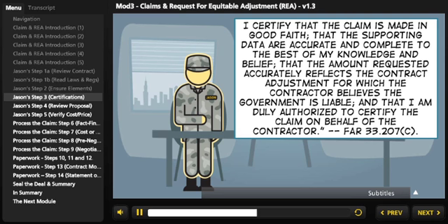If a contractor submitted an uncertified claim exceeding $100,000, Jason would notify the contractor, in writing, of their failure to certify the claim and that the contracting officer's decision will not be issued until the claim is certified.